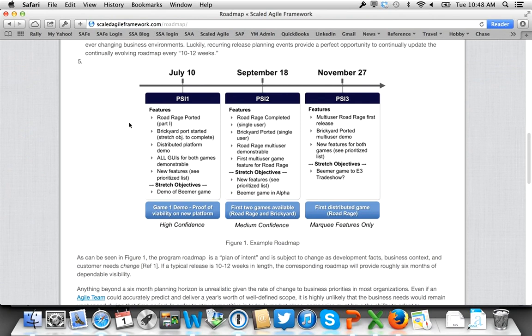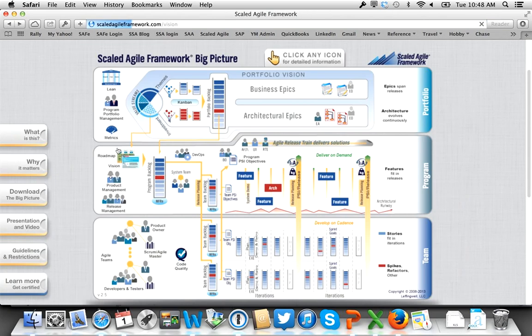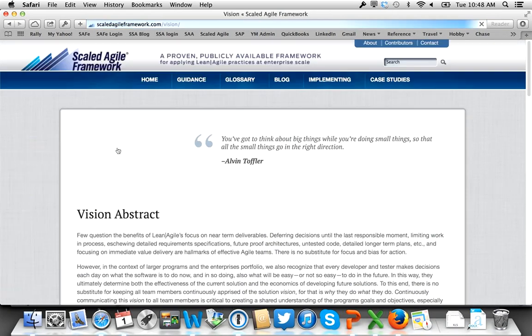Okay. So we try to provide at least a 4 to 6 month planning horizon for what we describe as marquee features, the big MVPs. Without much detail below that, because all that detail will hurt you. That makes sense, Dean, because what do you think happens? Do you think the market may change?